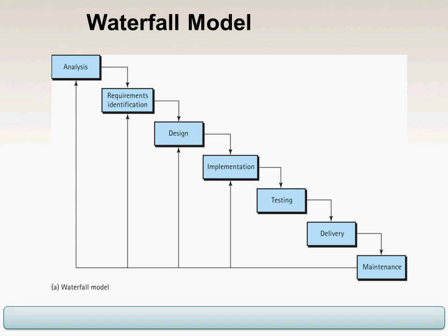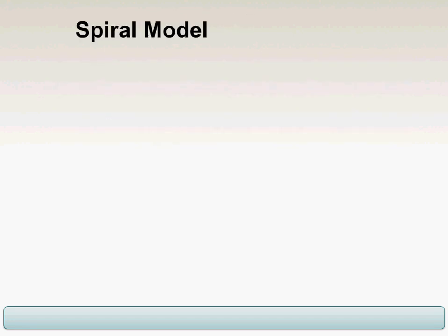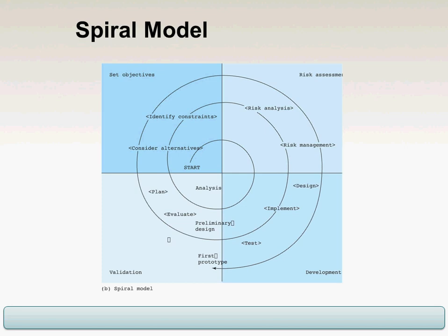So that's why the waterfall model is kind of out of favor, but sometimes you have to do it because sometimes you get paid after each of the phases. When that happens, typically there's an outside group that monitors what's being done at each step to make sure that there's no misunderstanding of requirements. So there's typically a software quality assurance group that looks at each of the deliverables that comes out of each phase of the project.